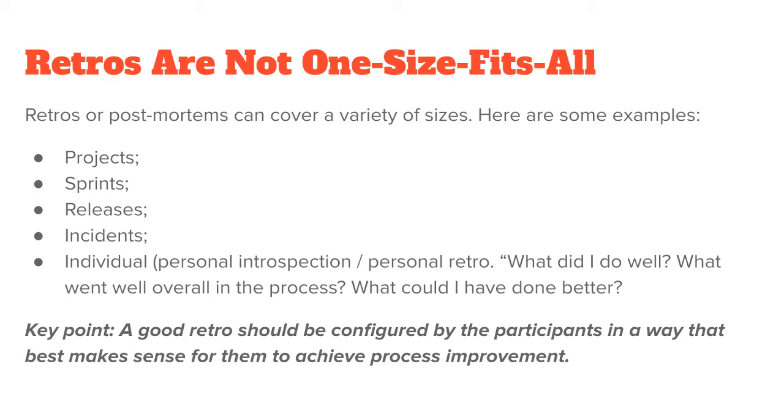You can also have a full project-based retro. I've been on teams where we do the sprint retros every two weeks, and then when we're wrapping up a major release, we'll have a major release retro, and instead of just the team, we're bringing in the project manager, the product owner, maybe some of our customer friendlies to talk about what it is that we launched, maybe some of the executives.